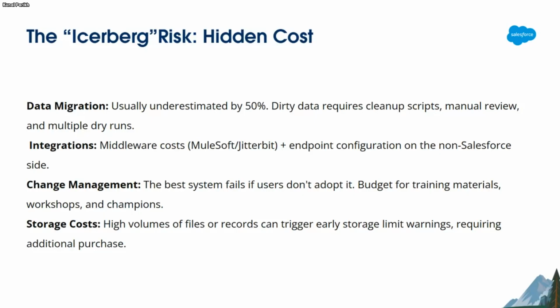Have a change management process. I mean, this becomes a very important thing. We'll cover this during the scope of work discussion as well, but a change management process is very important to have, where you have an understanding with your prospect or client of what will be a change, what will be the definition of change, and what the change management process will be.